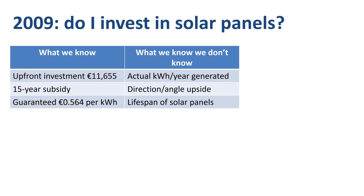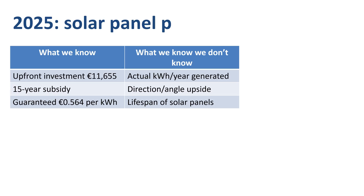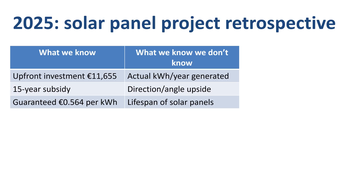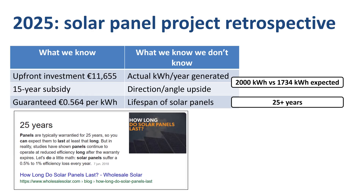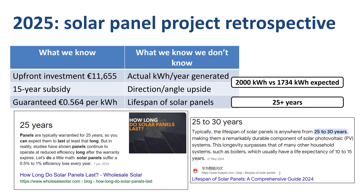Here we are in 2025, and it is time for a retrospective look at the investment. Actual generation per year was around 2,000 kWh versus the originally expected 1,700. Based on usage data, the typical lifespan turns out to be 25 years or more, versus the originally expected 15 years. All of the factors that back in 2009 were in the 'what we know we don't know' category turned out to be favorable.